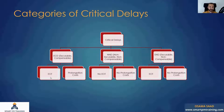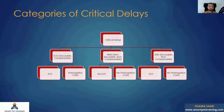The second category is NND — Non-Excusable and Non-Compensable. In this case, there is no EOT and there is no prolongation cost claim, because it is the contractor's default. It is still a critical delay because the project is in delay, but it falls into this category called NND.